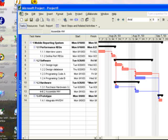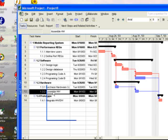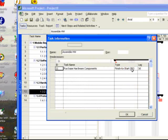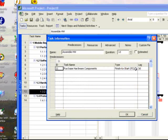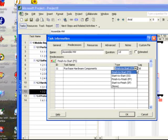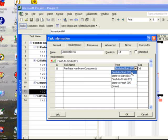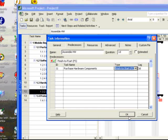What about the other kinds of lags? Well, we go back, double-click, and if we want, we just click that, and here you see you have the options for the three other kinds of lags. Just pick the one you want, and then insert the time frame in the lag column, and the software automatically calculates and introduces it into your schedule.